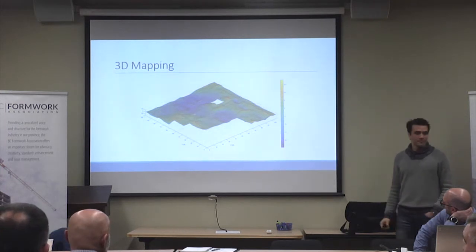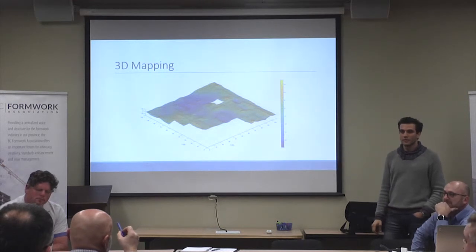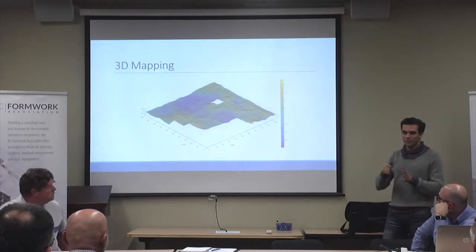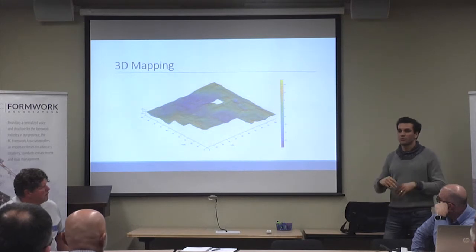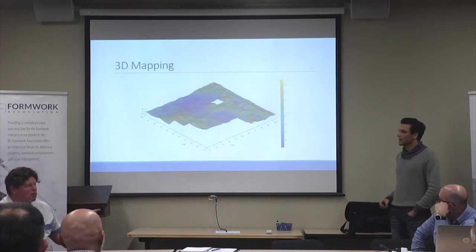Yes, sir. It's also fair to say that the 3D mapping will be different at month 3 as opposed to month 7. Exactly. That's usually done right before they want to put the flooring on, so that hopefully the majority of the deflections and curing and stuff has happened. Yes, exactly.